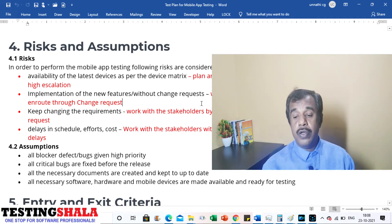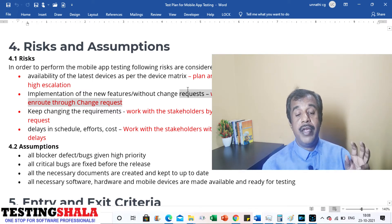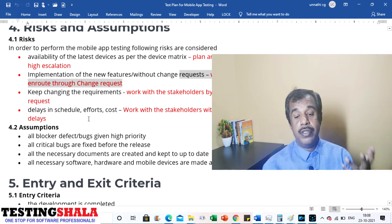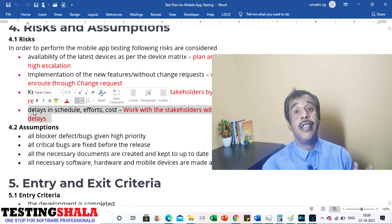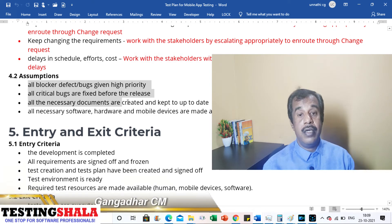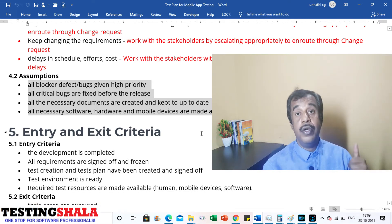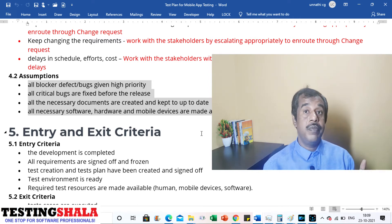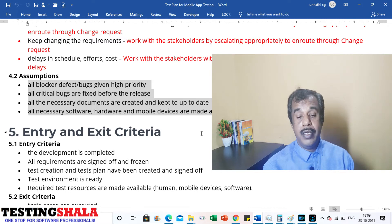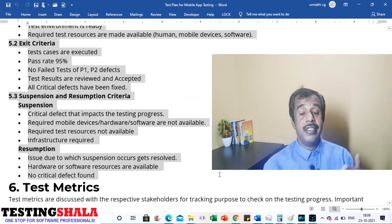Another risk is changes in features or modules — a proper escalation mechanism and change request process should be in place and documented. If there are delays in schedule, efforts, or cost, work with the appropriate stakeholders to get things on track. Assumptions include: all blocker defects are given high priority and fixed before releases, all necessary documents are handed over to the client, and required software, hardware, and mobile devices are made available for testing.